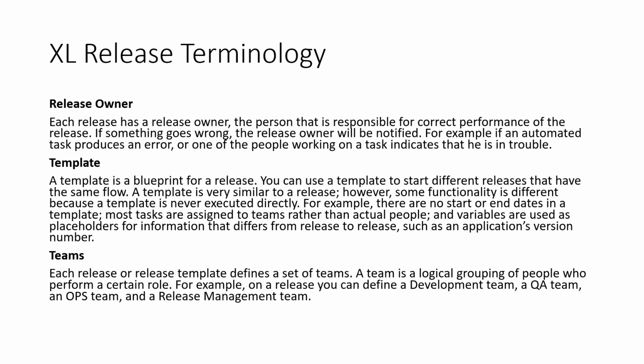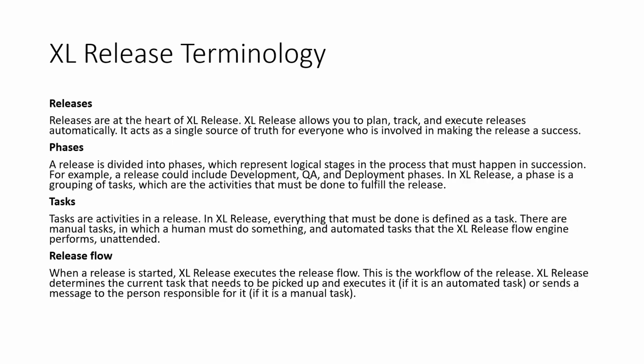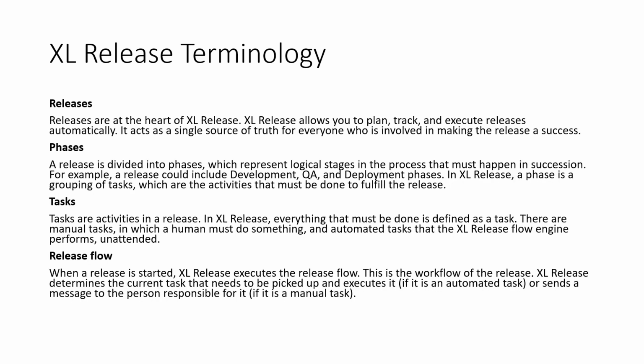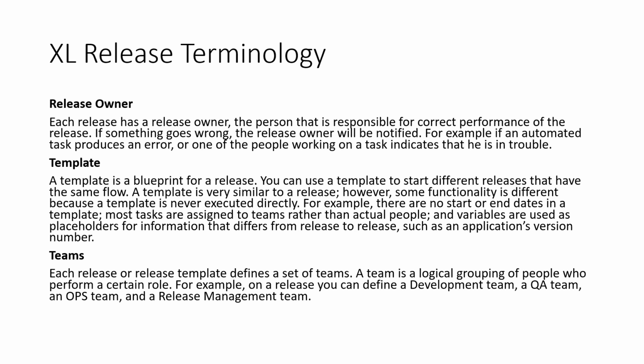Templates, this is the most important thing after the tasks actually. Templates are nothing but you combine everything. In the template you have phases, tasks, the release flow, owner, teams, everything combined. So a template is basically a blueprint for the release. You can use a template to start different releases that have the same flow. A template is very similar to a release.